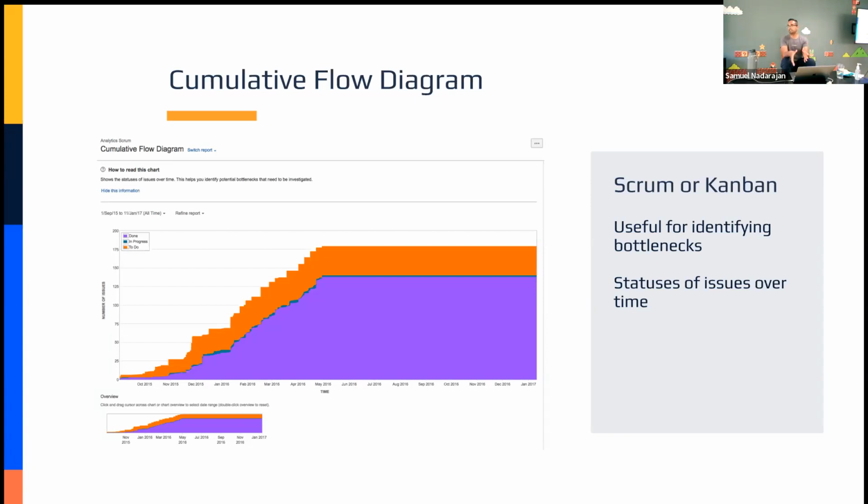On a cumulative flow diagram, that's essentially how you're calculating the bottleneck, except how you would identify a bottleneck on this graph is whether or not you see a particular color growing vertically over time. So let's take, well, this is not a very good example, and this was the clearest example I could get you. But let's say that the in progress column is this narrow band of green that appears right between the orange and the purple. Yeah, you have to look really close, right?